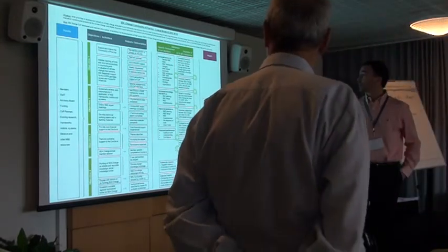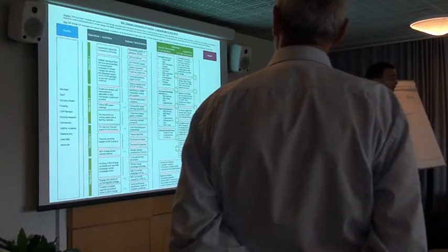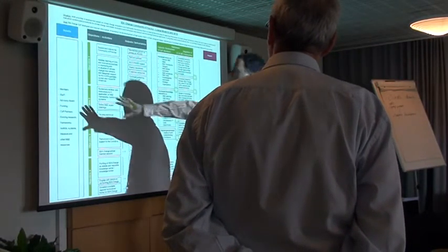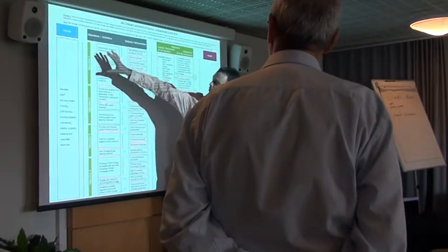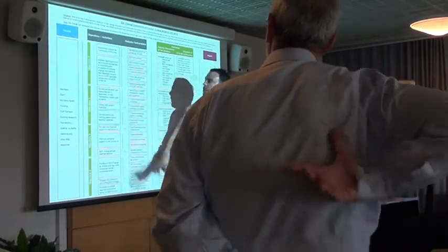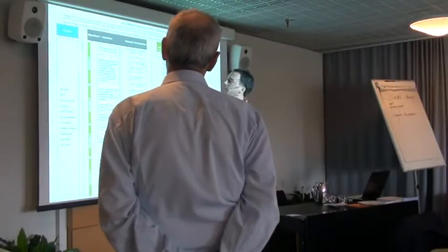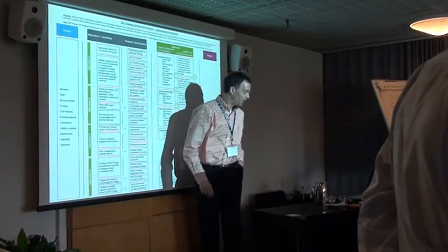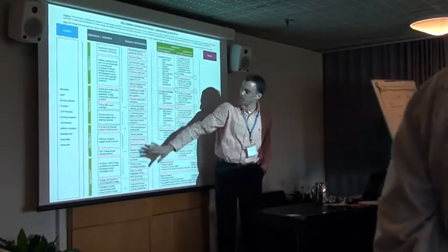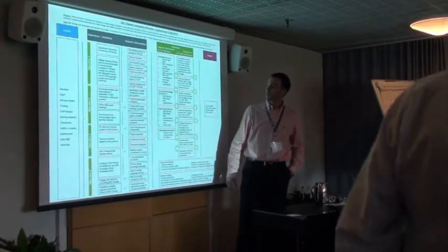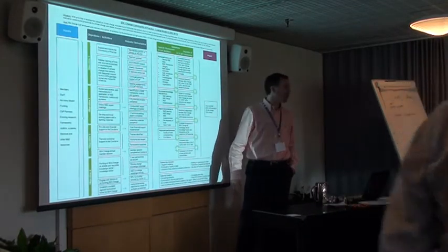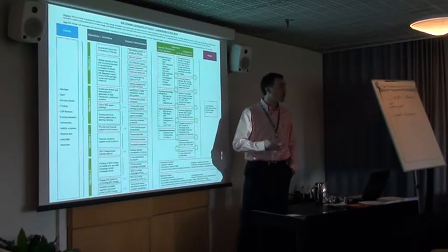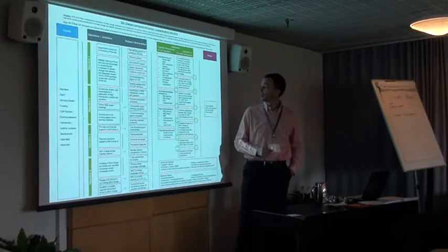Okay. What you see here is the sea change community of practice logical model, and it starts with the inputs at this side, and then it moves to the 4 objectives, and under each objective it has activities, and those have sub-activities and outputs, or deliverables. And this range of outputs, deliverables, are mainly part of the monitoring framework that we use. So that's an ongoing effort, an ongoing reporting towards our funder.